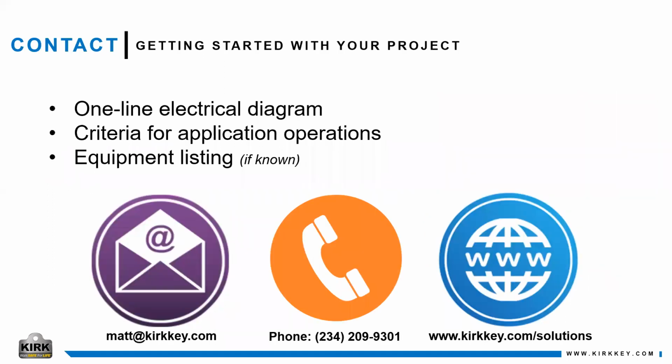So how do you get started with your project? As Matt mentioned in one of his examples, one of the most important pieces is if you have a one-line electrical design. That really does help Matt and his team get started with your project and lays everything out for them in one fell swoop, and starts the conversation and criteria for your application and operations. And as Matt mentioned, if the equipment is known at the time, that's also helpful to understand what provisions are available or if customized provisions are needed, so that when that equipment gets on site, it's ready to go for the interlocks to be installed.